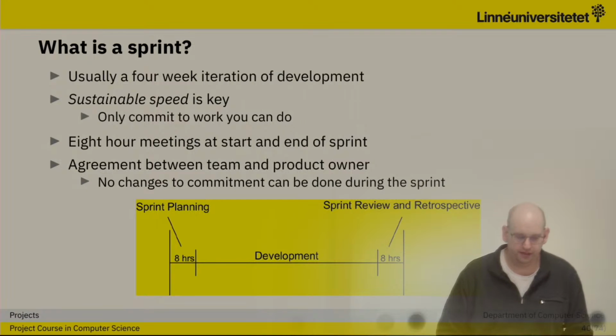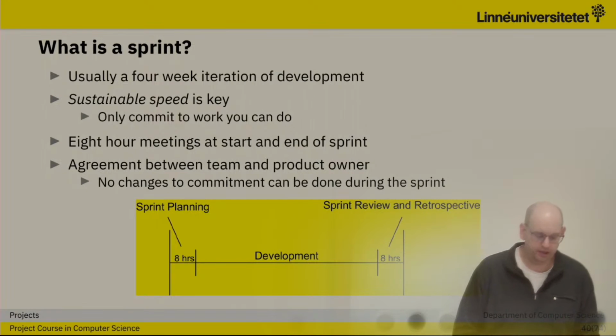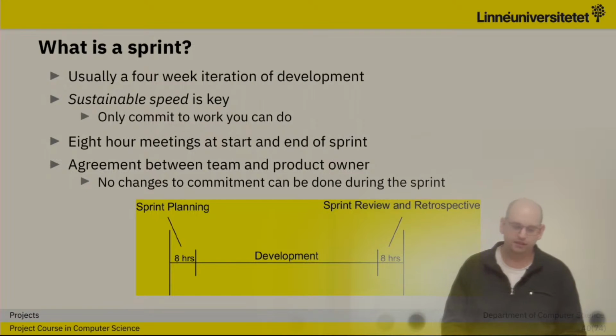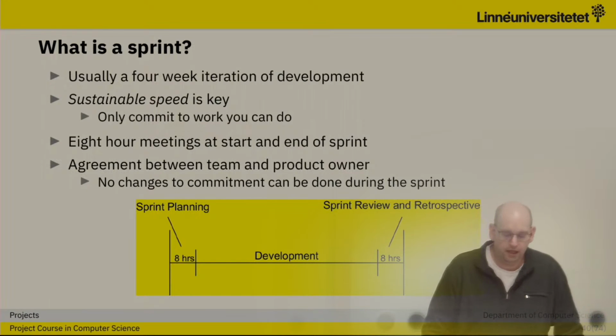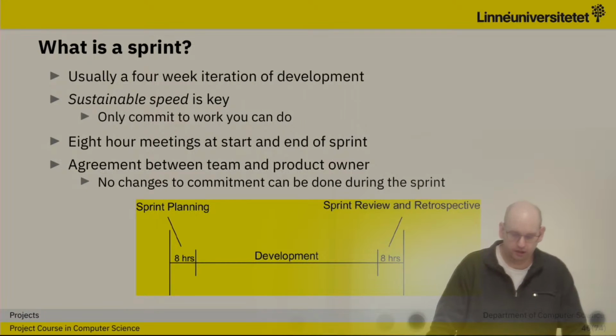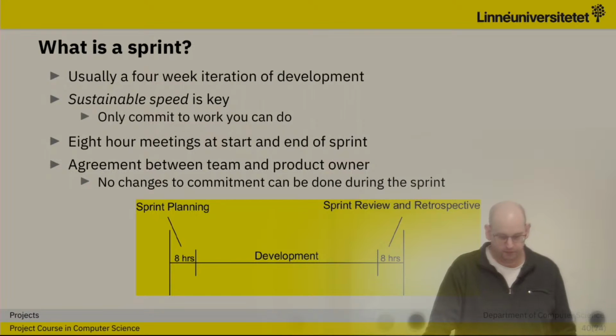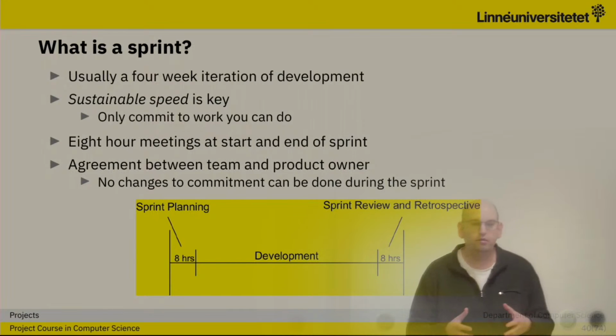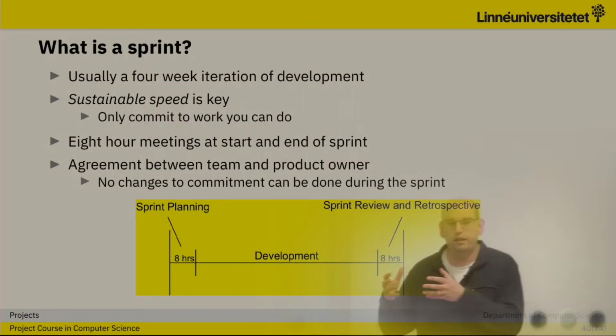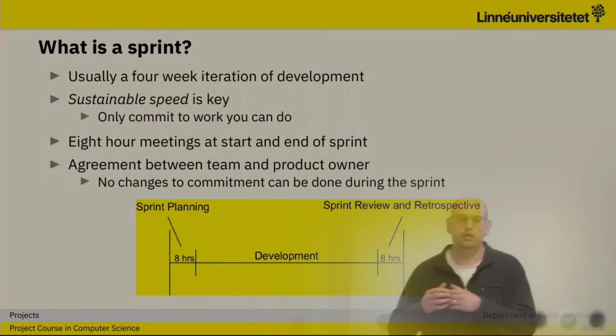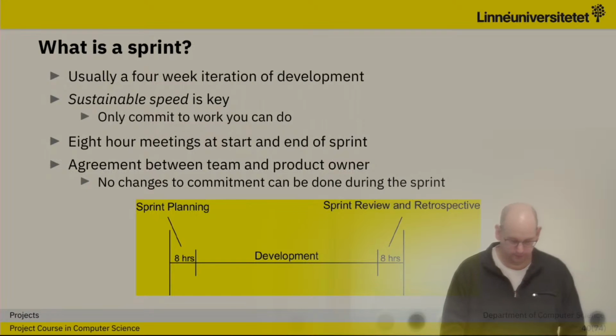So important here is a sprint. As we probably understood by now, a sprint is this 2 to 4 week heavy work period that we have in the project. And the important thing here when we plan for a sprint is that we want to have sustainable speed, meaning that we want to know that we can commit to work that we can get done during this time period.